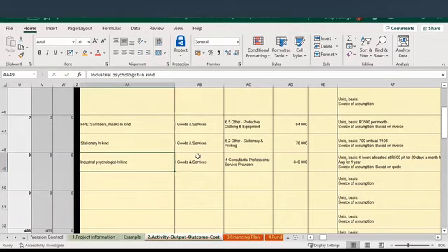I've done that here. They all fall under goods and services. I've sub-allocated them, and these are the specific costs per the in-kind good or service, and here are the assumptions. Because in-kind is not a cash item, we have to expense it in the activity outcome cost sheet, but we also have to recognize the income in the financing plan.